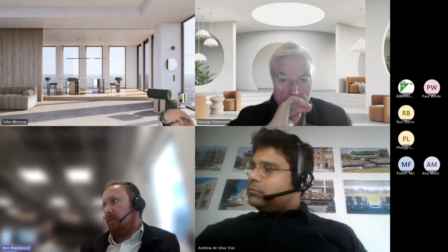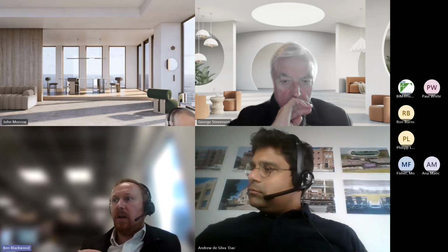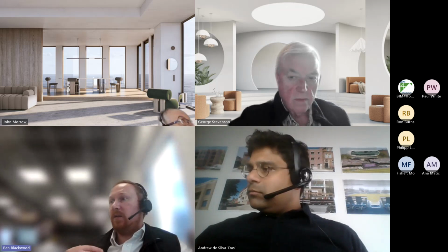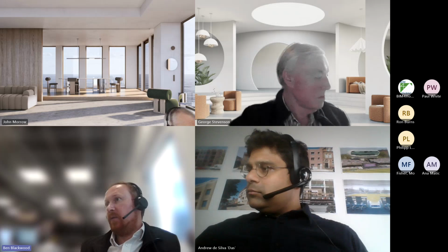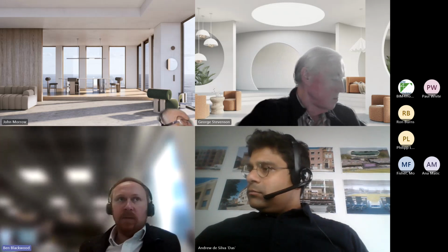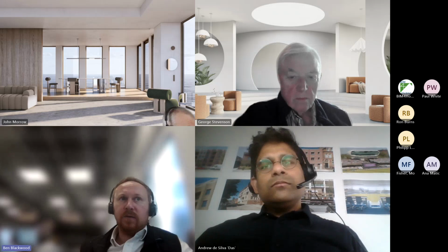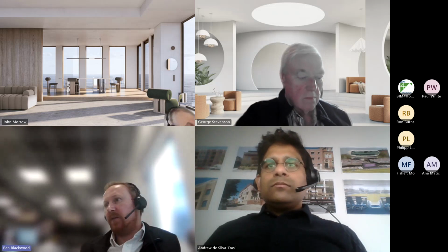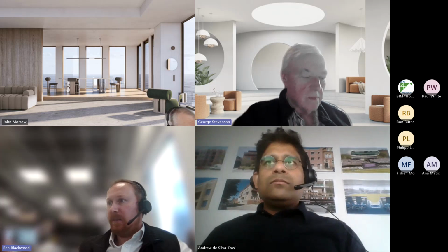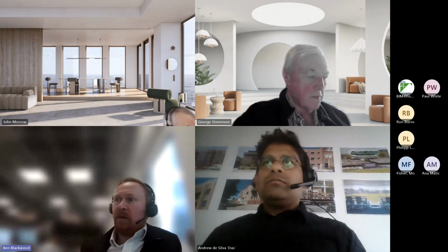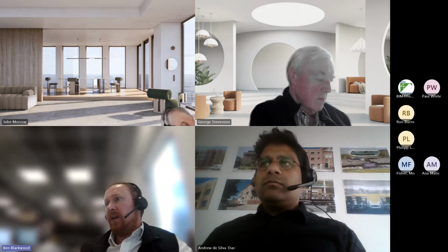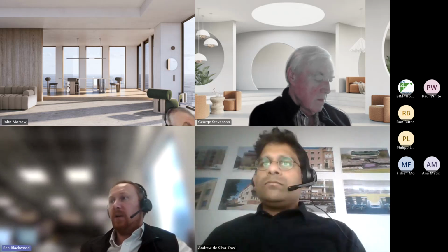I represent the client and I'm the gatekeeper of the information. The way we found this handover process to work most effectively is we do reviews monthly for the last 6 months before handover. And I say to the construction manager, unless you tell me something's ready, I'm not looking at it.